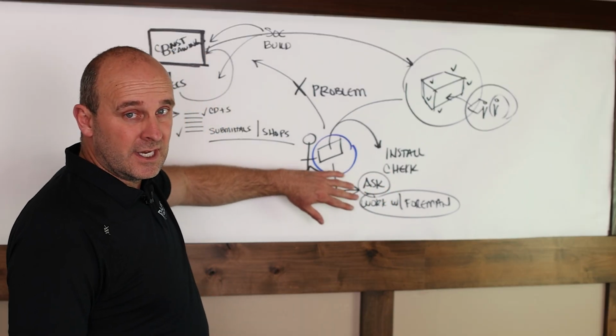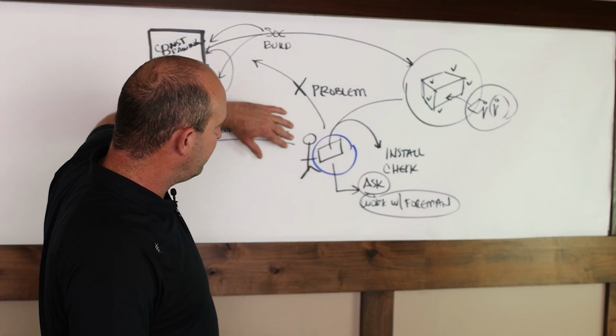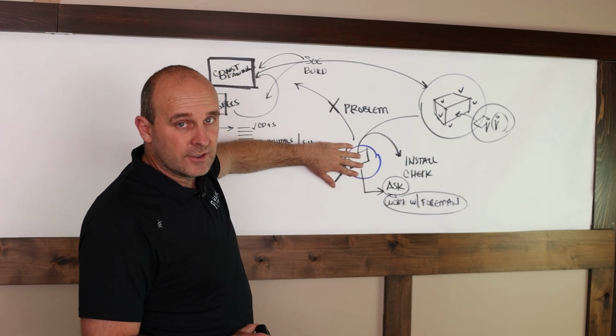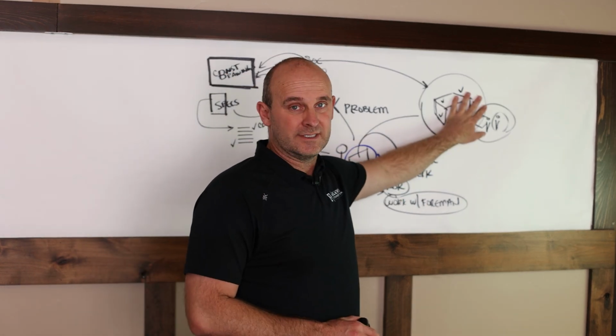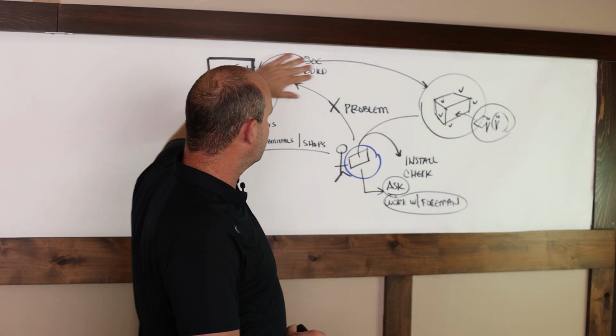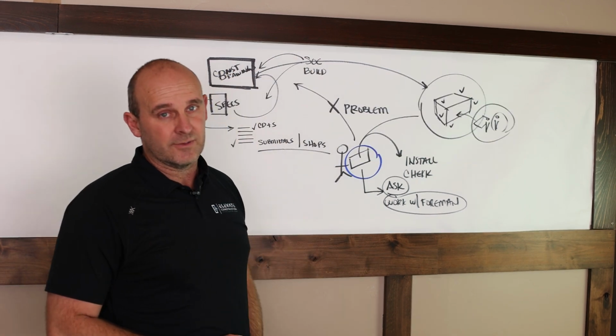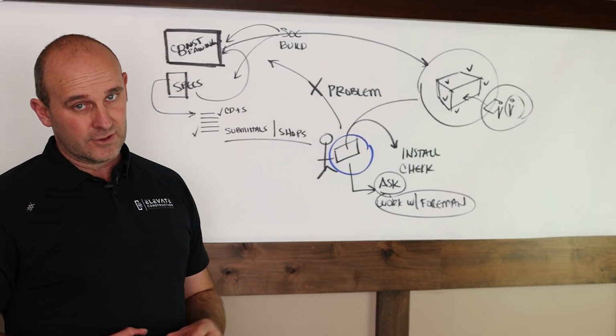For you as a double check, and this is really important, if you use the same drawings to double check it and there was an error on the shop drawings or the submittals, you're going to make the same mistake. So checking here either as a duplicate, as a double check, or primarily from the construction documents will not hurt you. And so I want to make sure that that's clear.